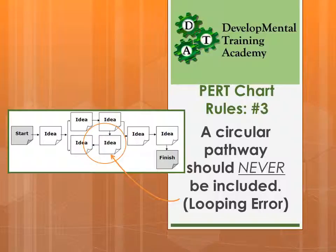The third rule: a circular pathway should never be included — this is called a looping error. If you have a look at this project, we start off fine, go through a series section, then into two parallel sections, but then that leads back towards an idea at the front, and what you end up with is a loop that is very difficult to get out of. That is a looping error and it's a real problem on a project because people get stuck and can't move on to the next task effectively.